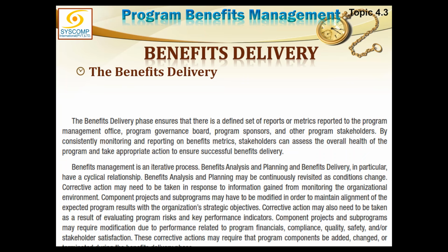Corrective actions may also need to be taken as a result of evaluating program risk and KPIs. Component projects and sub-programs may require modification related to program financials, compliance, quality, safety, and stakeholder satisfaction. These corrective actions may require that program components be added, changed, or terminated during the benefit delivery phase.